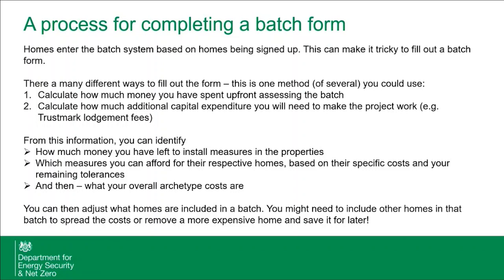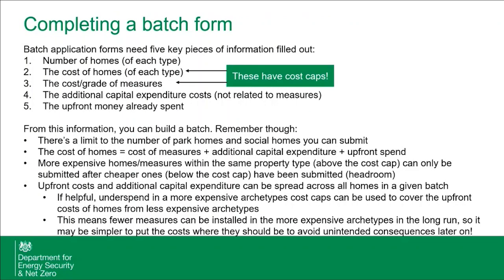I was just going to say, Monty, with Richard on this one, the upfront costs are in terms of surveys and all the rest of it. I didn't think that was classed as capital expenditure. So you have the option of logging surveys and upfront money as capital or A&A, depending on what works for your local authority. So this is more just about if you do end up capitalizing those costs. But yeah, you have as much option to move them into A&A as you would like. We're not prescriptive about that. So really, it's just whatever works for you.